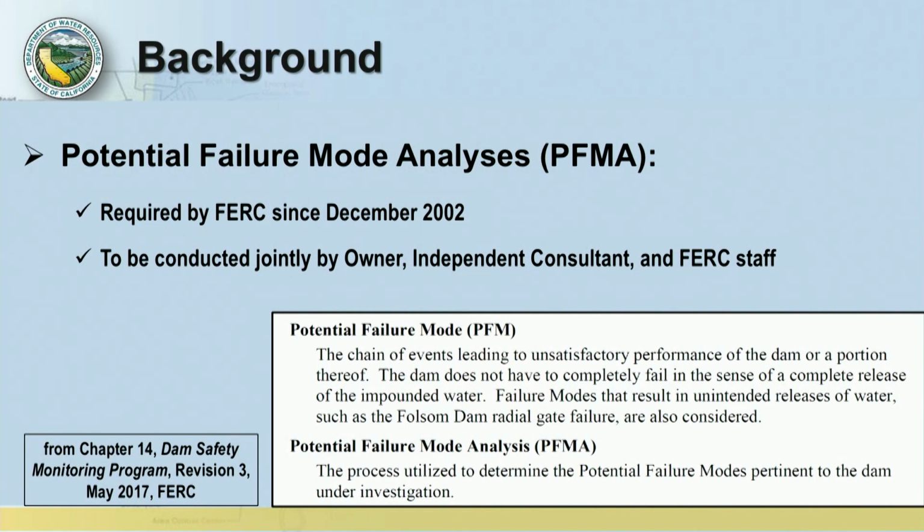So, potential failure mode analyses. This has been required by FERC since December of 2002. It's to be conducted jointly by the owner, the independent consultant, and FERC staff. And a few definitions: a potential failure mode, PFM, is a chain of events leading to unsatisfactory performance of the dam or a portion thereof.